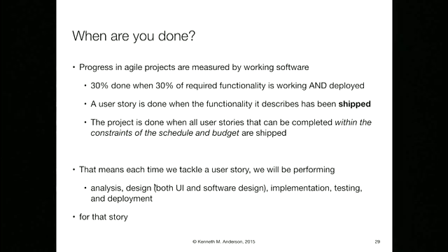is that when you tackle a user story, if you're actually going to give it to a user and let them use it, when you go back to your home or your coffee shop or wherever you code, this means that for that user story, we're going to be doing analysis, we're going to be doing design, we're going to be doing implementation, we're going to be doing testing, we'll be doing integration testing, system testing, acceptance testing, and deployment for that whole story.